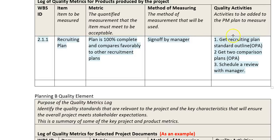What would we need to do in order to measure this? The first thing we'd have to do is figure out what 100% complete means. It would be nice if our organization had some standard outline that they use for recruiting plans. If they do, that's somewhere in the organizational process assets, so that every time someone is putting together a new class for a different type of student, they don't have to start from scratch.